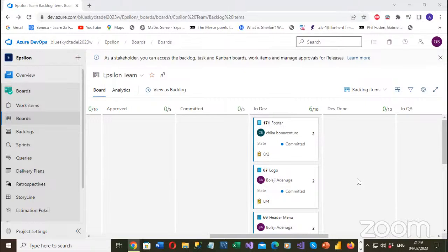Okay, that is fine. So QAs, please, anything that you think is amiss, tag your developers, because right now your developers are the next people that you need to pick up work from to test. They may not be able to join the stand-up, but whatever you're reporting at the stand-up, I'm going to go into that stand-up and say, oh, I got the test URL from the developer yesterday, because the stand-up format is you report what you did yesterday, what you are doing today, and if there's any impediment.